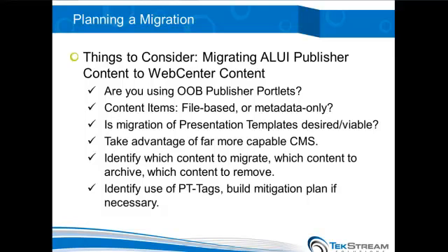Older than 1 year, it's still going to be available, but I'm not going to worry about making it look pretty. I'm not going to worry about matching it to the look and feel and going through and changing those formats. I'm just going to stick it over in this archive over here. It's going to still look a little bit like the old site. If you want to get to it, they have their way of getting to it if they need to.